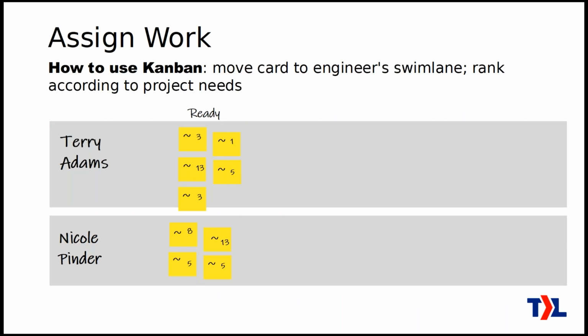So as far as using Kanban here, we've shifted the swim lanes. So now in a new part of your wall or your whiteboard or whatever you might be using, you're going to shift over to using a member swim lane. Notice, our swim lanes aren't by project here anymore. Now they're by the member because now we're assigning them.